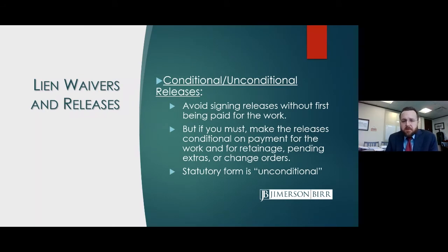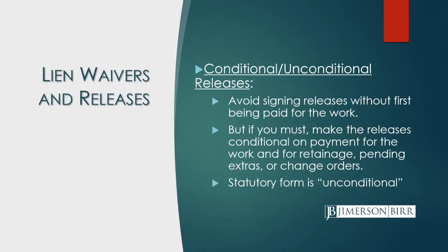Lien waivers or releases, that term waiver and release is used interchangeably here. They're conditional or unconditional. Conditional means they're only effective if you received payment. Unconditional means they're effective even if you did not get paid. That's a pretty important distinction, because you're giving away your lien rights by that waiver, but you didn't get paid.